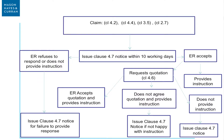This probably looks quite daunting but it's meant to demonstrate how the whole claims procedure ties up. Your claims will arise in five situations: clauses 4.2, 4.4, 3.4, 3.5, and 2.7. Within 10 days you issue your clause 4.7 notice.